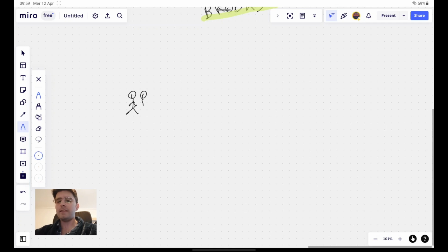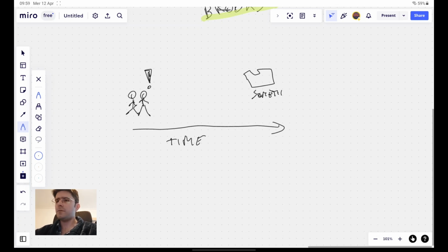what they can deliver in a given amount of time, accepting that the scope will not be exactly what we want. Only if satisfied with the result, then it's worth to continue and put more stuff into the scope until the project hits a satisfying completeness. It's kind of the other way around when you think about it. Instead of first deciding the scope, we first decide resources and we give them a deadline. And then we see how much can be effectively delivered in that time.